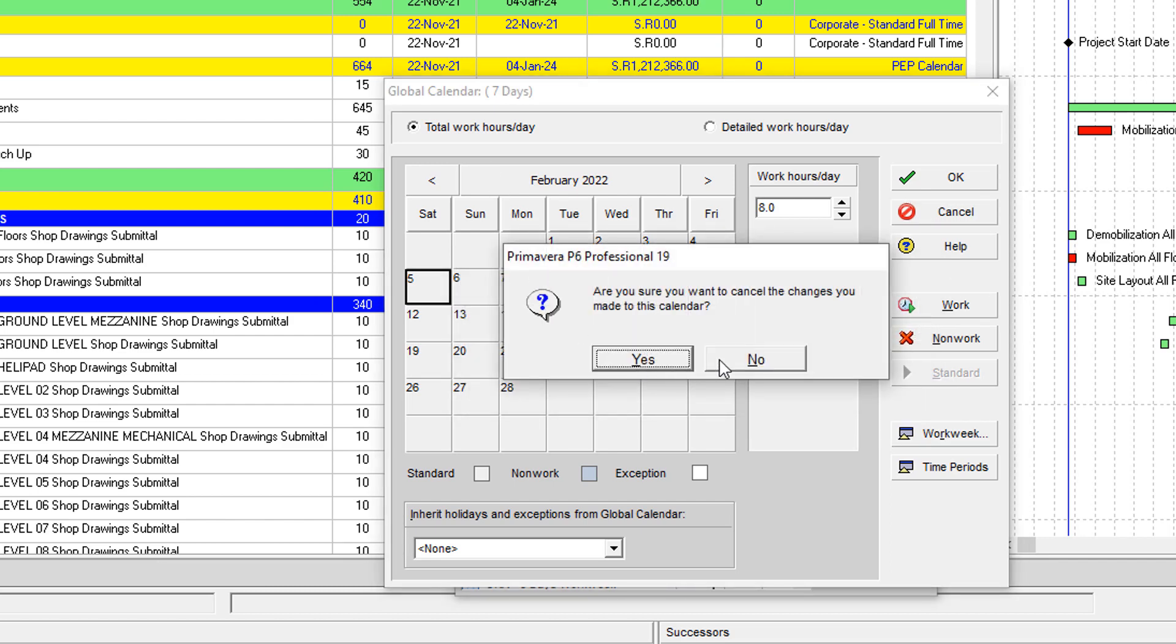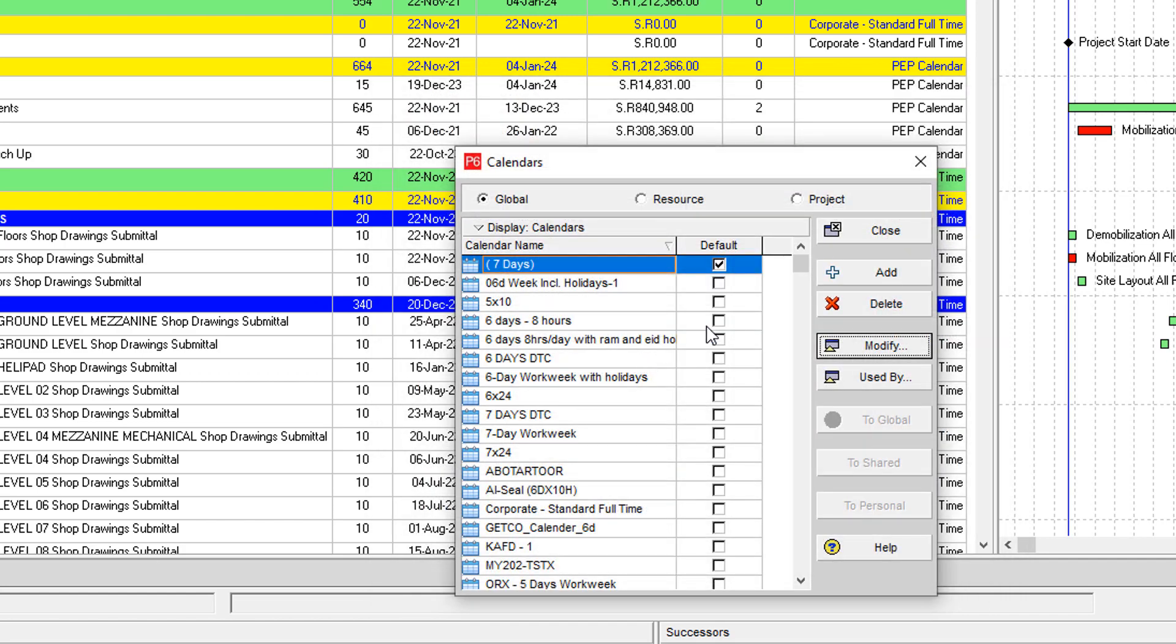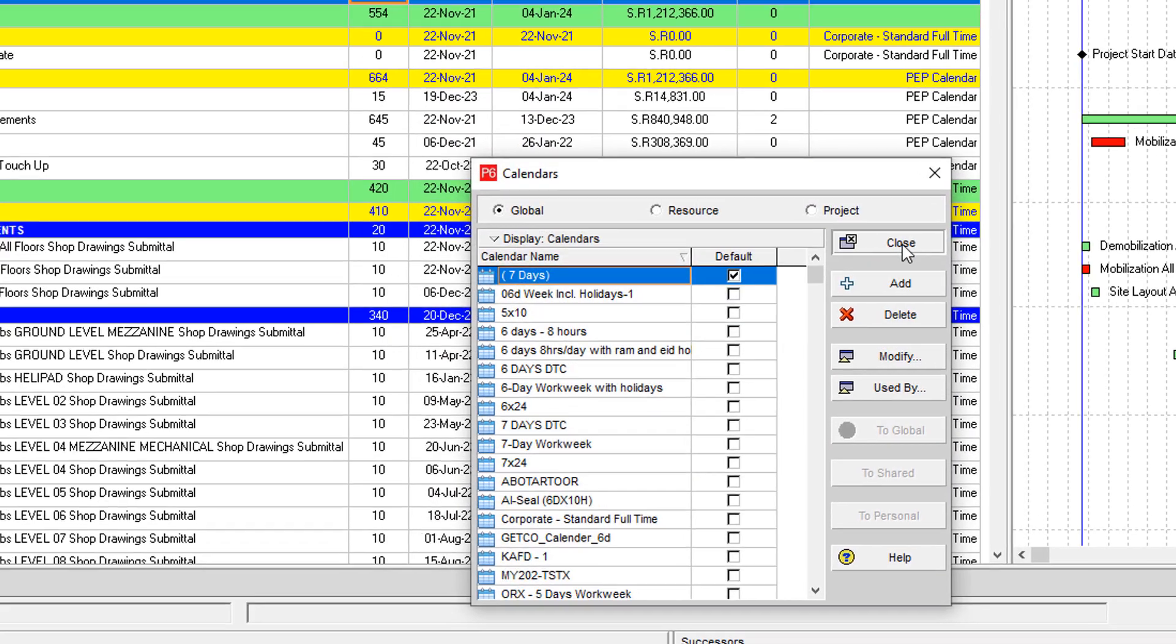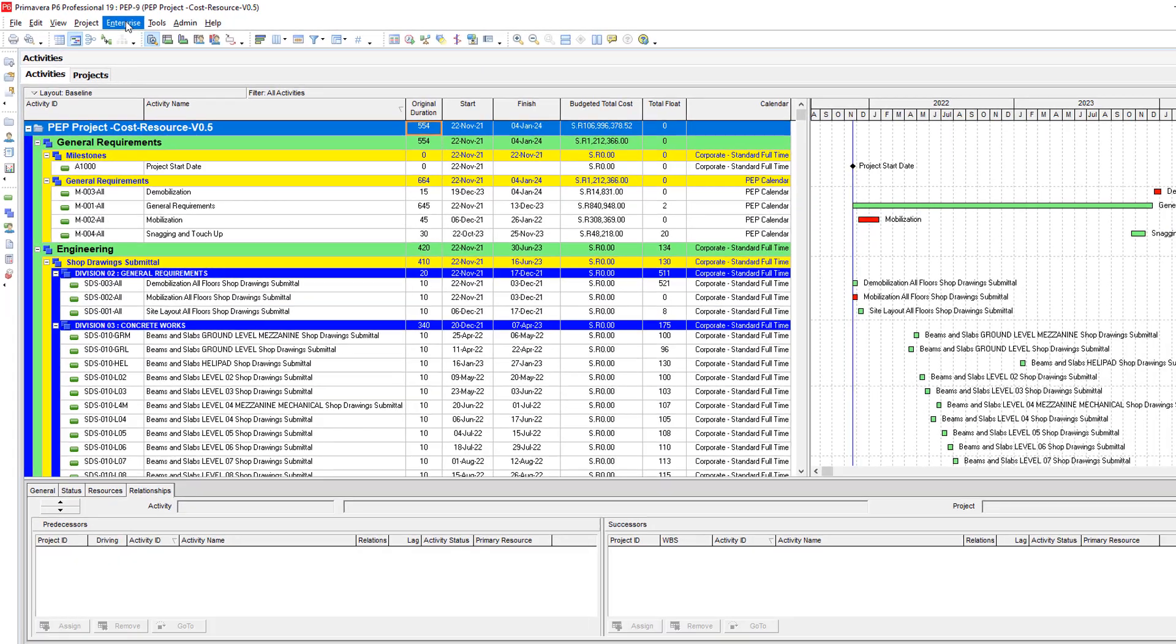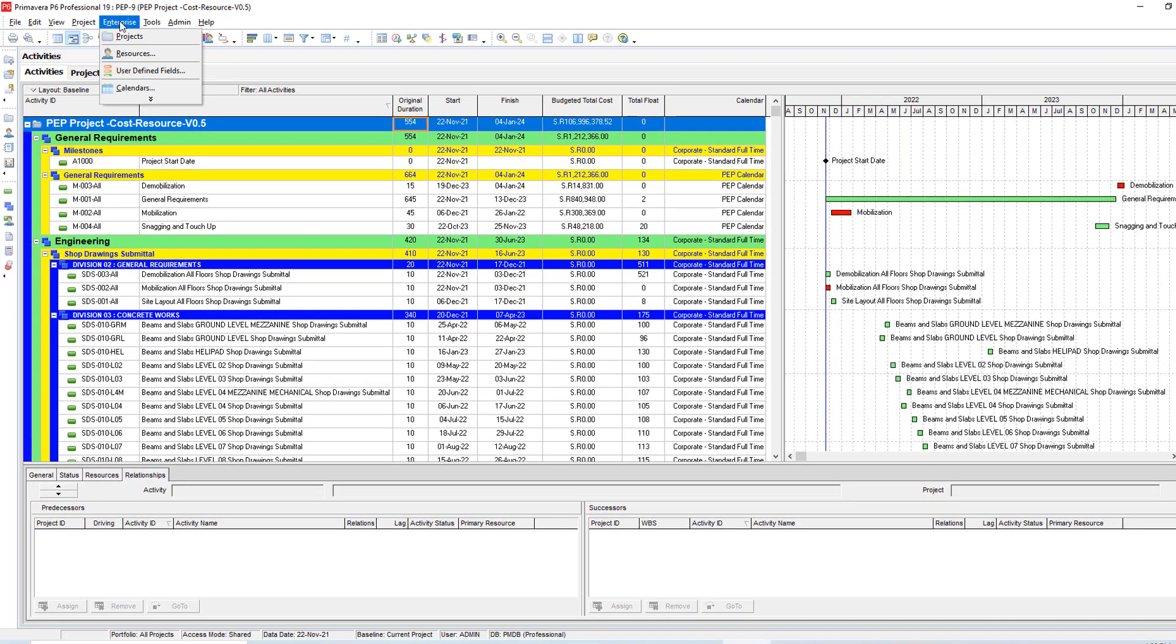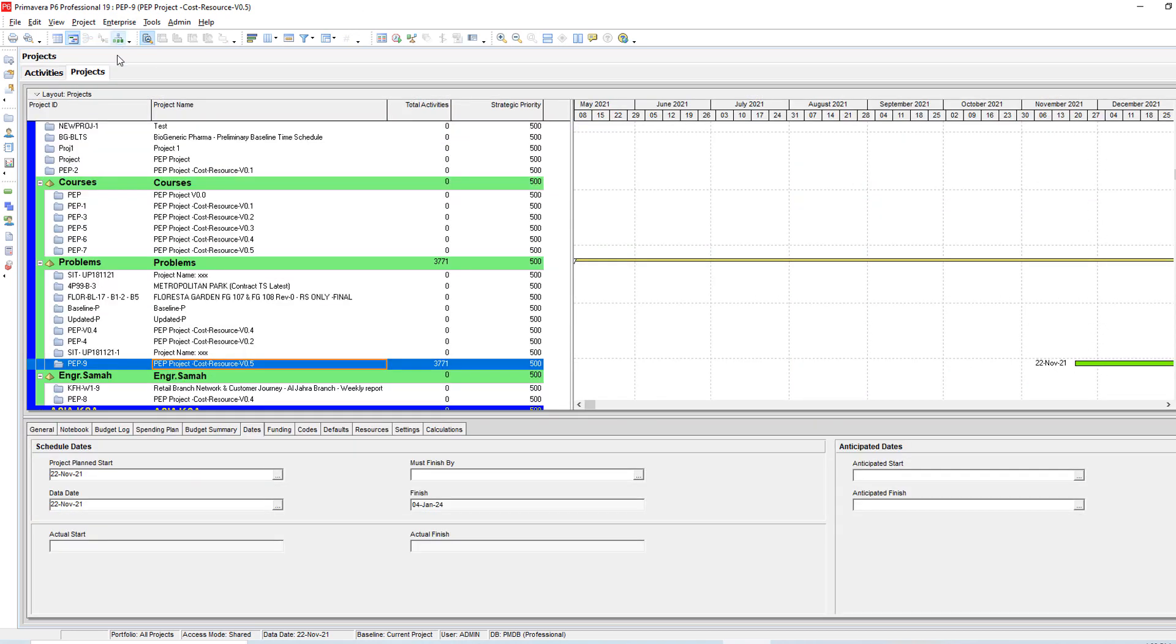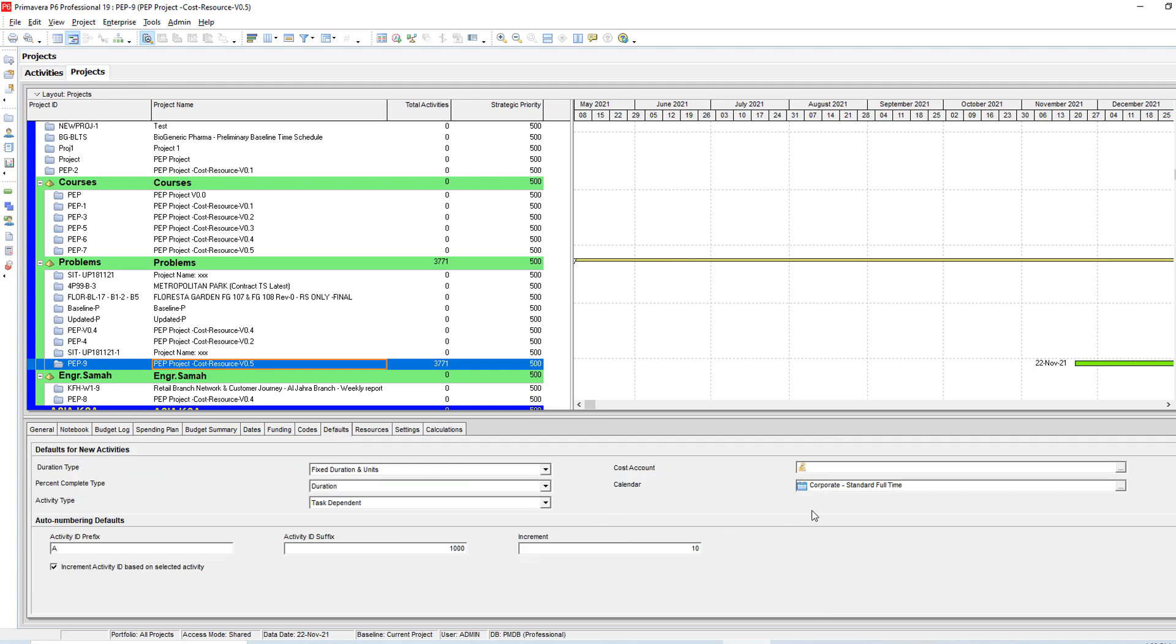But Hany, we changed this one and nothing changed here. Yes, this is the second trick I would like to tell you. After you do this one, go to Enterprise and then Projects and select your project and go to the Defaults. Then change your Defaults calendar from here. But before doing this one, let me check if it is calculating the working days correctly or not.